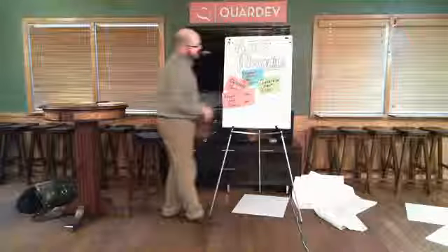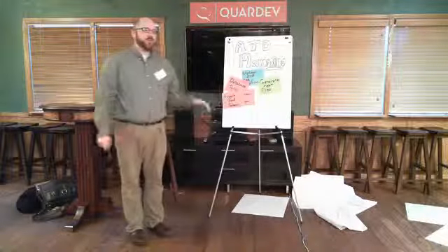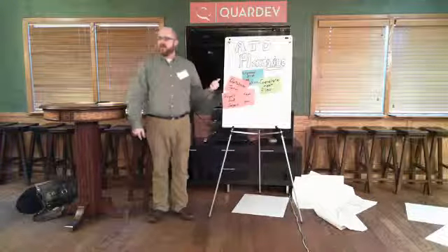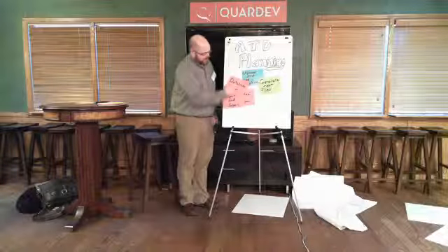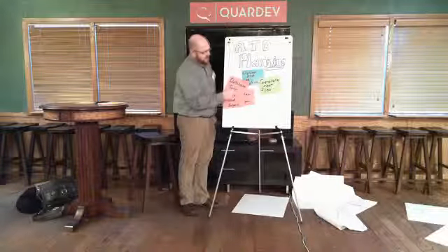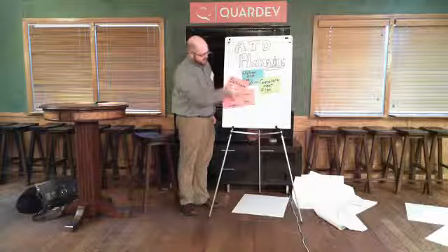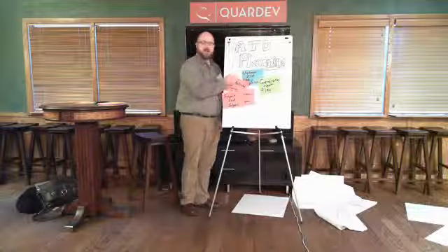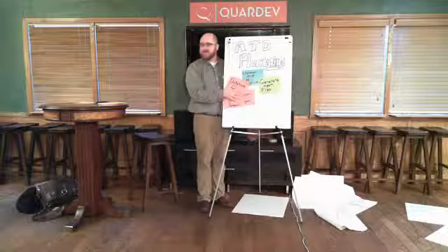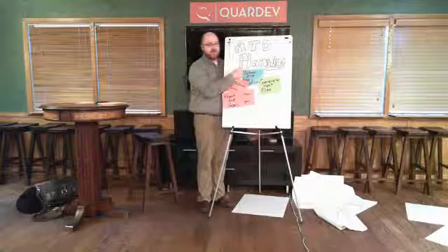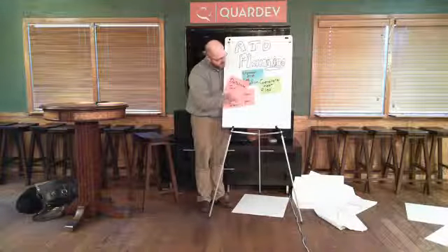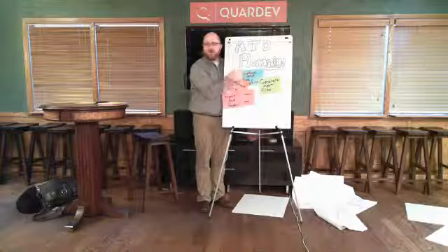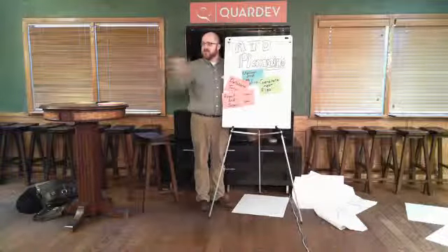What you see here is one of my favorite tools for planning of a co-located team: just physical stuff. It lets the dev folks communicate about their jargon, but it also tells me, when I look at this, how much stuff we have to get done before this is going to be ready. So we automatically have feedback to the team. If we say this is our first test, how many hours are in this work and this work? That's a good sense of how far down that timeline we're going to be.